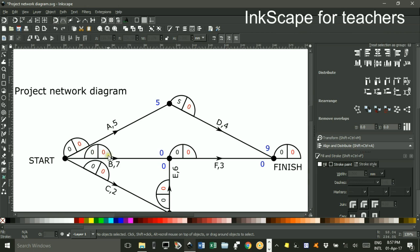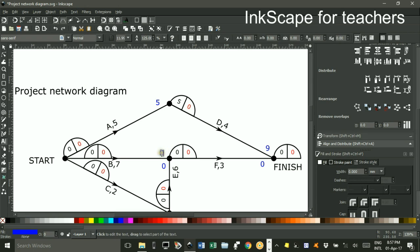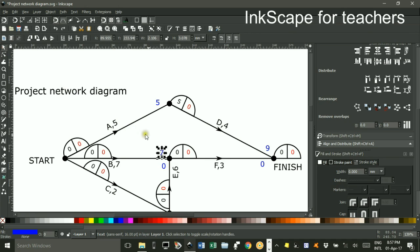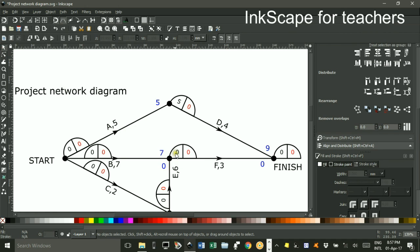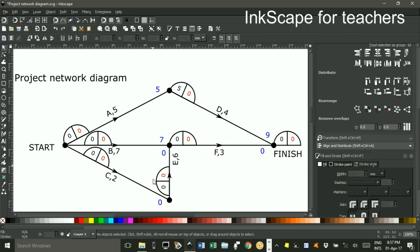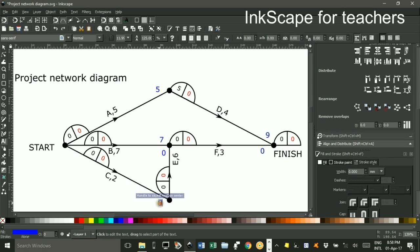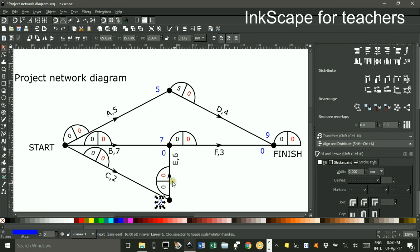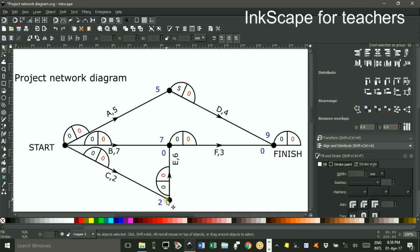Coming along activity B, 7 hours to get to this point. So I'll make that 7. I won't put 7 in here because it might be longer. I might have to wait longer for E to finish before I can get to here. Going along activity C, 2 hours to get to this point. So that's all I can do there. So I'll put a 2 in here.